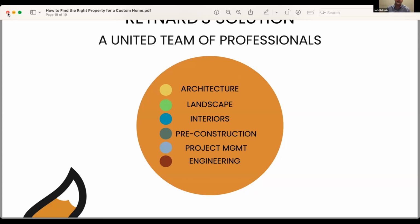I highly recommend that. So how do we charge as a company? Myself, I charge a flat fee. I don't charge for revisions. I don't charge for trip charges or hourly, there's no variables. When I engage with somebody who wants to build a custom home, I give them a design fee that is a flat fee broken up into 4 phases, and it's based on the home itself. It's based on what they're trying to accomplish and which of my team is going to come to the table to design. Because I have about 6 individuals on my project and design team, and I need to make sure that they're well paid for the time they're going to put into it. So I understand what the project's going to cost me before I quote it. But once I quote it, the client will know exactly how much it's going to cost from day one to the day that they get everything they need to go start building. I hope that helps.